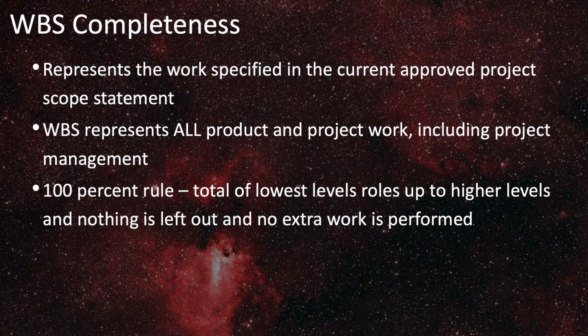The work breakdown structure needs to be complete, meaning that it represents all of the work that's specified in the currently approved project scope statement. The WBS represents all of the project and product work, including project management.